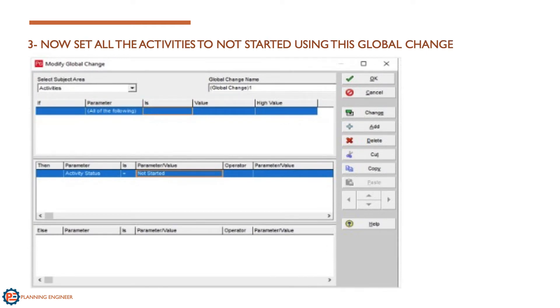The third step is to set all the activities status to not started. Now we have removed all the actuals from our schedule. Only one more step is remaining.